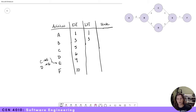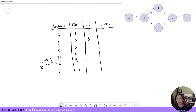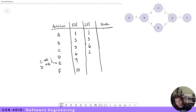Then let's look at C. Our earliest start date for C was five. When we were calculating the earliest start date for E, it was nine days, because C can actually get started before D. Although the path from C to E and D to E are the same length, C's task can get started before D's task. So actually, the latest start date for C is six days, and this will not delay our project. D's latest start date — if D got delayed, it would delay the entire project — so the latest start date for D is six. Then E's latest start date is nine, and F's latest start date is ten.